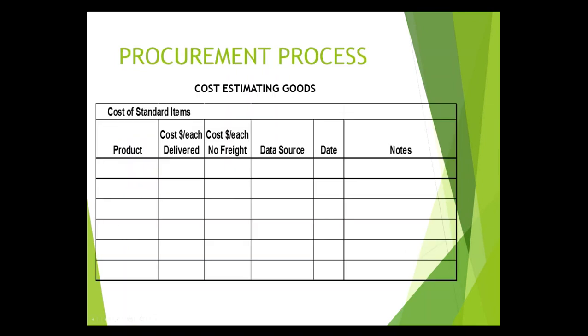Again, this is a form that you can use that we actually think that you should be using just to standardize everyone's procurements. And you can put the product cost each, make sure to include delivered, all those things that come up after you have started to engage in the process that add additional cost should be captured in the ICE. It really consists of comparing total cost of the same or similar products, goods, and services from a variety of vendors. That's really what the ICE does.